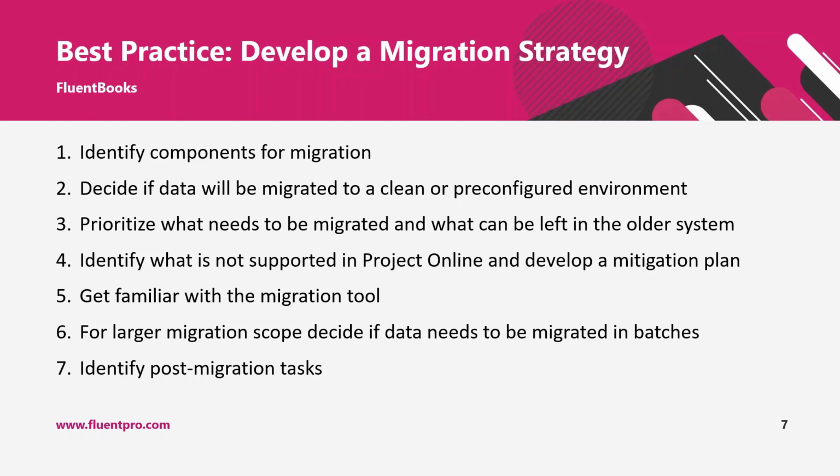And there you would migrate again your PWA configuration to preserve the integrity of projects. And you would migrate those 400 completed or cancelled or archived projects and project sites that are related to those projects. In this way, you will have in your production PWA only the data that is currently necessary, and